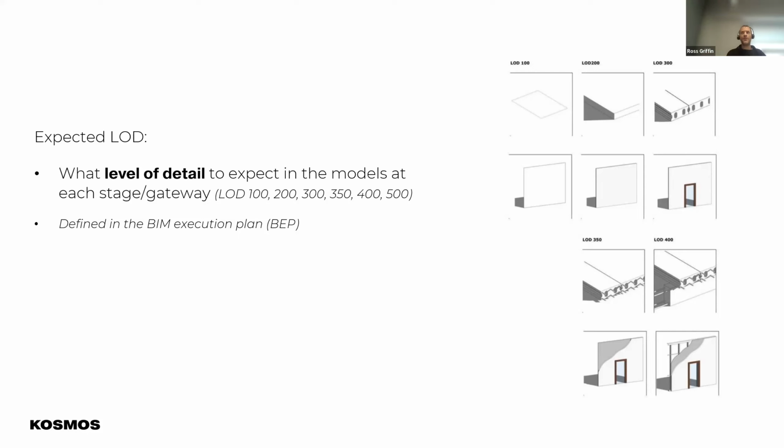LOD 200, as you can see, is just a shape. It hasn't been defined what exactly that is. It could be defined as a concrete slab. Whether it's in situ or hollow core, we don't know yet. That's a conversation we would need to have with the design team. That's why those conversations are important. Even at the early stage of the design, you might not have the structural information. Really, you're sitting down with the architect or engineer trying to define what you expect it to be in order to be able to quantify, et cetera, the price.